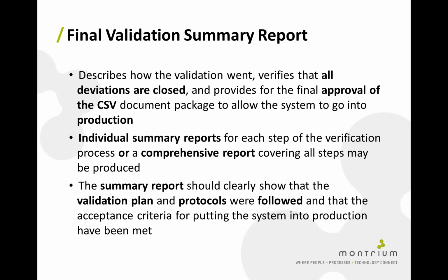It will also indicate the rounds of testing that occurred, and then it will provide final approval of the documentation package, which allows the system to go into production. In some instances, depending on your SOP, you may also want to have a release memo. It depends on the organization. Now, you can do one large summary report, or you can do individual summary reports for each stage of testing, and then you can just summarize those individual summary reports. It's really up to you, and again, quite often your CSV SOP will dictate this.